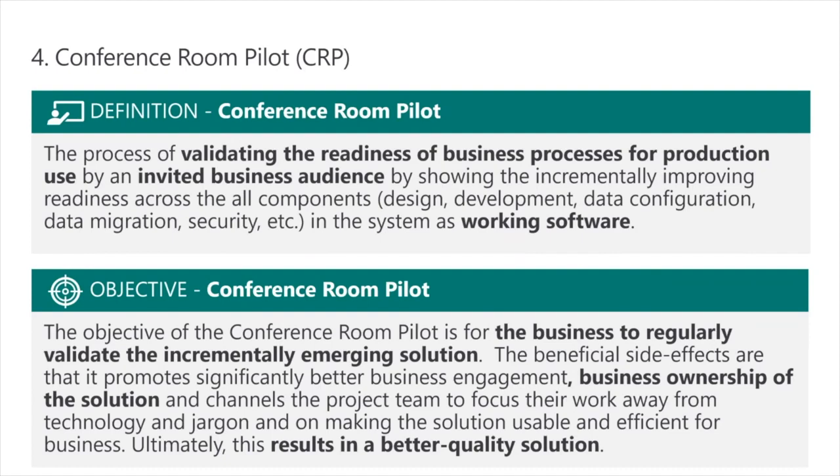And what we mean by a conference room pilot is the process of validating the readiness of business processes for production use by an invited business audience. So the idea is that you show the business process first as a logical flow in terms that the business understands. So this is all in business language that they understand. And then you show them that process within the Dynamics application. So you're saying, you remember we said this is the process.